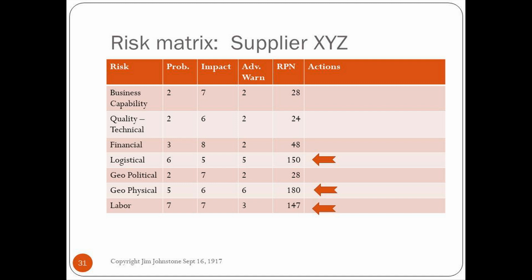You have used each one of your individual risk matrices to come up with a number of the probability of occurrence of supply chain interruption due to each one of these factors. If it's low probability, you gave it a low number, 0, 1, 2. If it was high probability, you gave it a high number, 7, 8, 9, 10. Then you added a column to show if that happens, what is the impact on our business or on our customers. High impact, high numbers; low impact, low numbers.